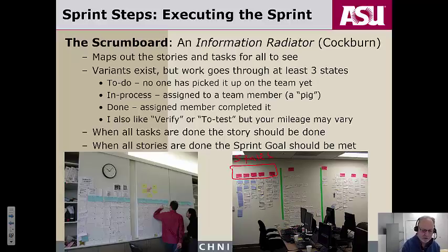All right, and again, those states are things like, hey, this needs to be done. It's unassigned. No one's picked it up in the team yet. Or, hey, the next one, it's in process. Somebody came along and said, hey, this is something I'll take responsibility for starting, I'll do. That's something a pig does. Okay, they worked through it, and normally I like a stage or a state where something's in verify or to test. In other words, the pig finished it, but now it needs to be tested in some regard.